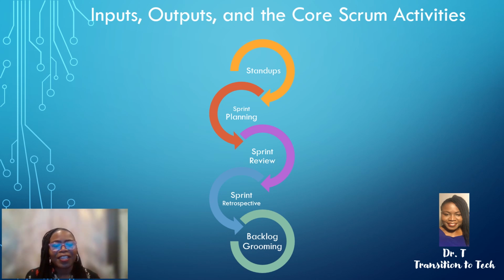So then there's the sprint review. This is the time for the team to show and tell. We've had our list of priorities over the sprint, and the sprint could last 2 to 3 weeks. And the team has committed to a set of work items, and now it's time to show the work.